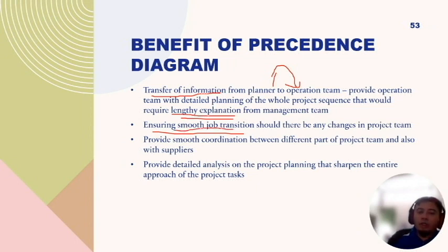Second is to ensure smooth job transition. There will be job transition between, let's say, a piling activity and the substructure reinforced concrete team activity. So the transition will be smooth. For example, the substructure team would know when the pile driving work could be completed, when they can start excavating and start pile cutting. So you will avoid any unwanted delay, as all operational teams are aware of the sequence of work.